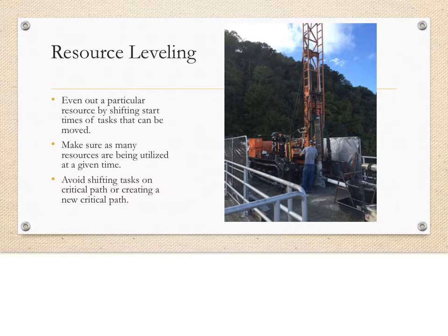Equipment like the drill rig shown here cost money just to mobilize and demobilize them to and from a site on top of their daily rental rates. So you want to make sure that they only have to mobilize to the site once, and that once they are on site, that they are fully utilized.